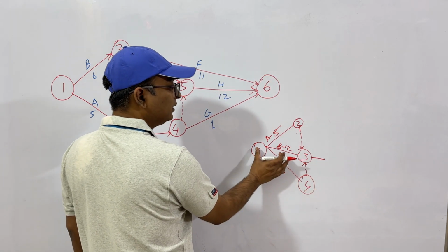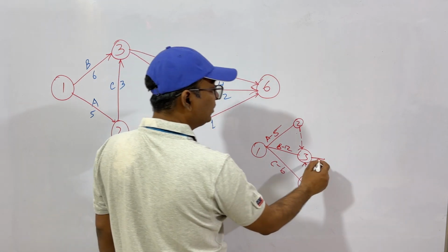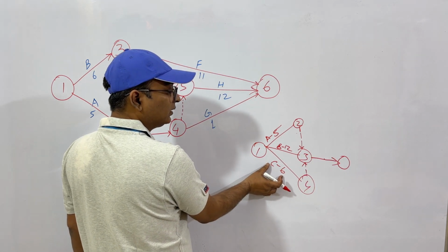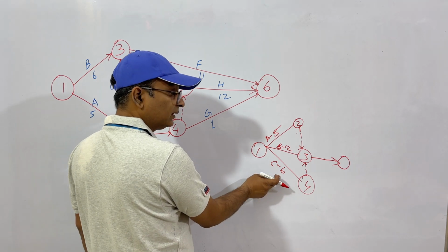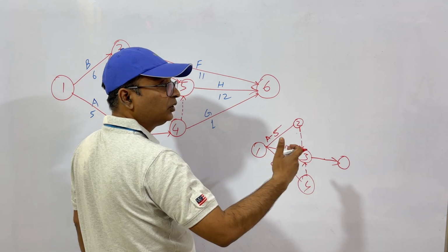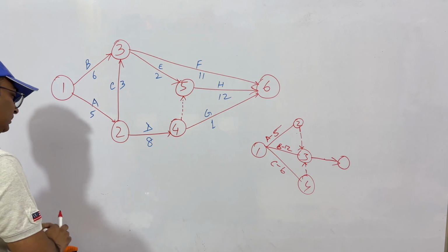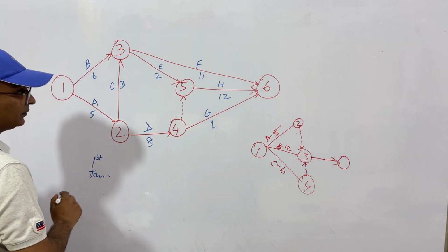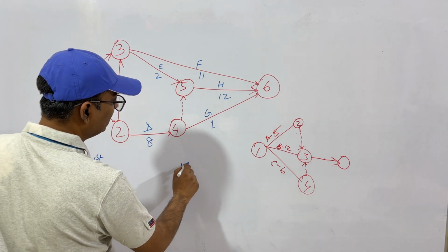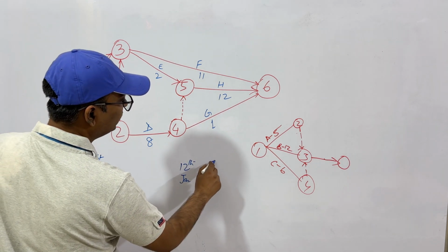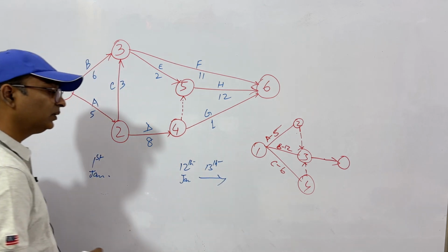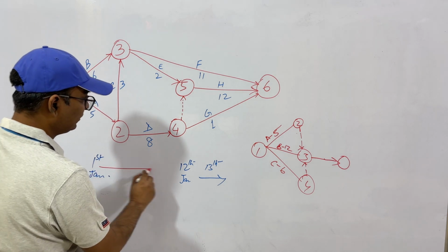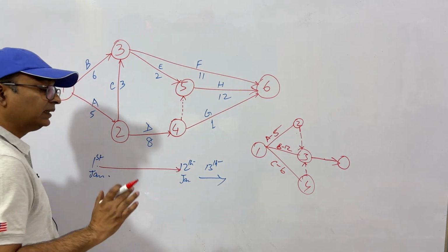Only after this activity B is completed, then only you can go to your next activity. So the duration of completion of activity C is 6, but you have a window of 12 days. That is, if you have started on, let's say, 1st of January, then you'll have to wait till 12th of January. You'll start the next activity only on the 13th of January. So your B activity will fill all this gap. That is, start and end dates are determined.